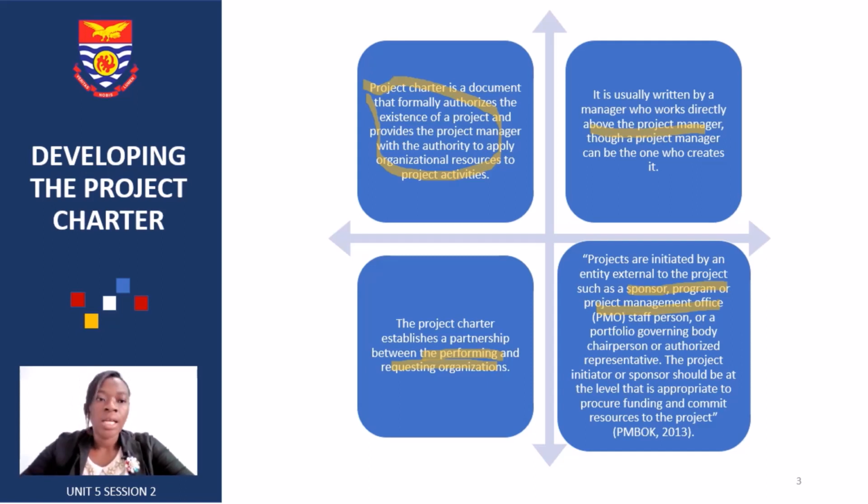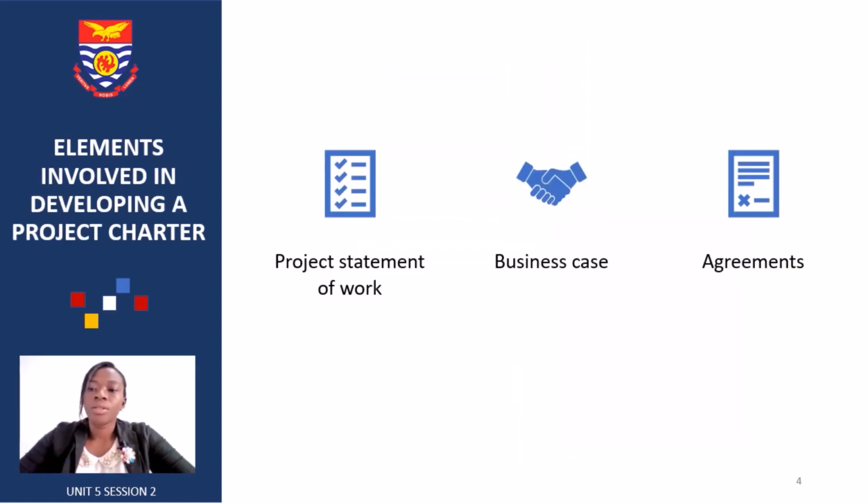These are three key elements involved in your project charter. We have the statement of work, which helps you commence work. It is a tool, either internally or externally used, to govern the project activities performed by the vendors or the department within the project. It's a legally binding document, and clients must approve of it before you can even start working.